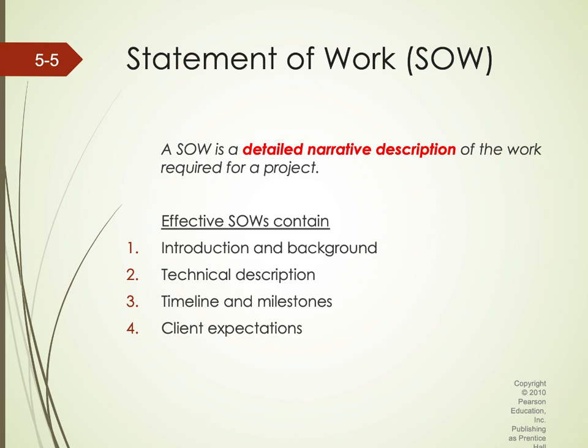So you need to have it in black and white in order not to keep changing the software or the project. That is quite a cumbersome task, and from there you at least have evidence for the customer, and in the event there are any changes, they will incur more charges, where you can make a lot of money on that.